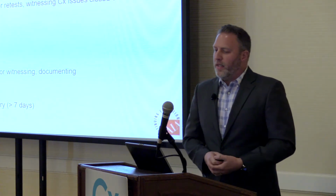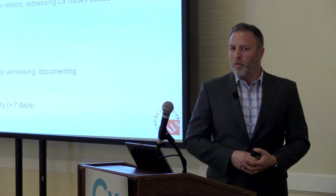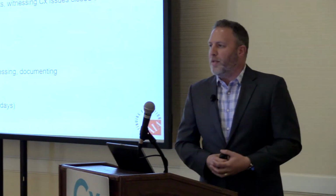Your level 6 activities really are just your final commission report, closeout documentation, training if you had any scope, operations and maintenance review if you had any of that scope, and you're turning that deliverable around. We're seeing our commissioning authority turn that around in about 5 days. That way the client has it. He can go to his end user and say, here's your data center, completely working.